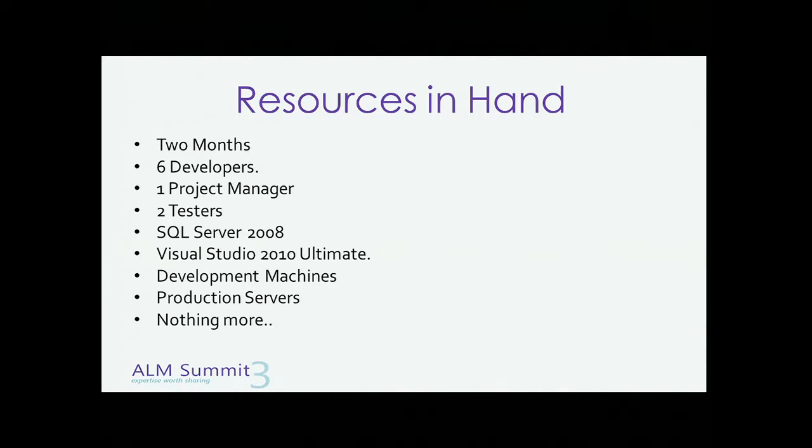At the beginning, I would like to review with you the very limited resources that we had in hand to develop the solution and accomplish all kinds of testing, including the load testing mission. We had only a 2-month period to develop the whole thing, 6 developers, 1 project manager, 2 testers, SQL Server 2008, Visual Studio 2010 Ultimate, and some development machines and production servers, and nothing more.